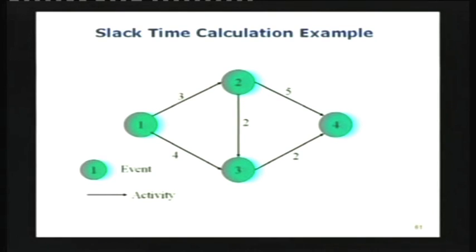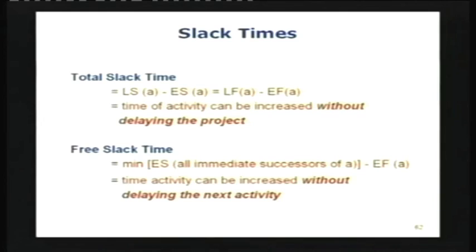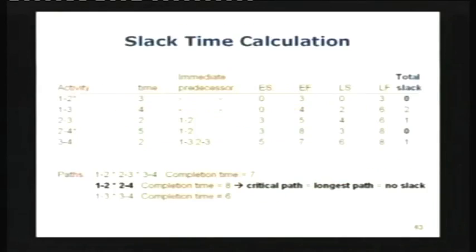What is the slack on activity 2? 1 is there, good. Activity 1 connecting to 3, 2, that's a good slack there. And connecting 3 to 4, 1. Obviously 1 to 2 there is no slack, and 2 to 4 there is no slack. So we have identified this pretty quickly by doing the same thing that we did earlier. If you walk through this, you can verify your answer. If you want to see what the answer is here.